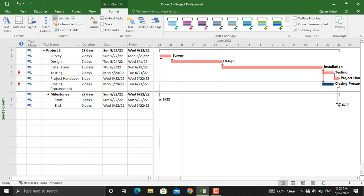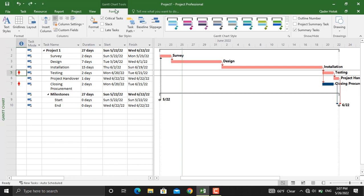This activity is not in the critical path, the closing procurement. But if we apply resource leveling according to its definition, our critical path should be affected in order to level the resources or the conflict that has appeared in here.